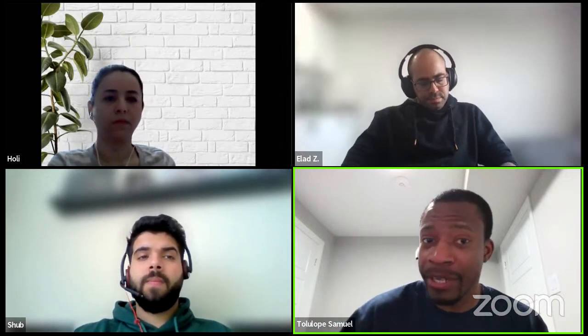So I'm not saying that you have to cover every single thing in one meeting. It's actually impossible, right? But you want to think through, how many meetings do I think I need with the stakeholders or with this stakeholder group, so that I can prepare them ahead of time. They can know that, okay, the expectation is that this is going to take XYZ period of time. This is how many meetings I think I need to commit to, so that they're not going back to their team to say, hey, this guy's wasting my time. I keep getting meeting invites.